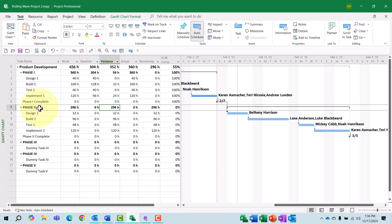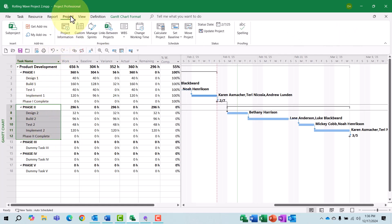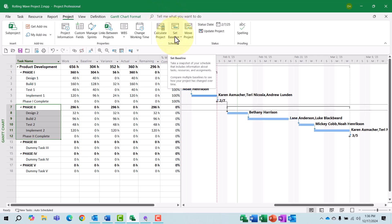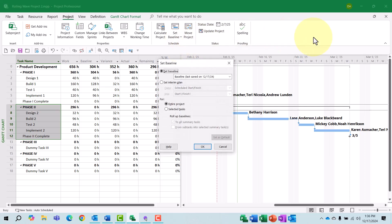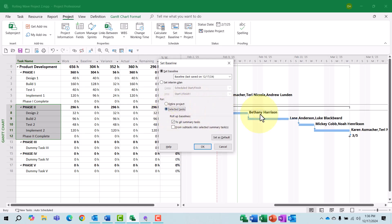Here's how I'll do it. I'll select all of the tasks in Phase 2. I'll click the Project tab to display the project ribbon. I'll click the Set Baseline Pick List button and choose Set Baseline. In the Set Baseline dialog, I'll leave the Set Baseline item selected and I'll leave the Baseline Set of Fields selected. This is important because that must be the operating baseline for the entire life of the project. In the bottom half, I'll choose the option Selected Tasks and the option To All Summary Tasks, which will roll up these baseline values to row 0.